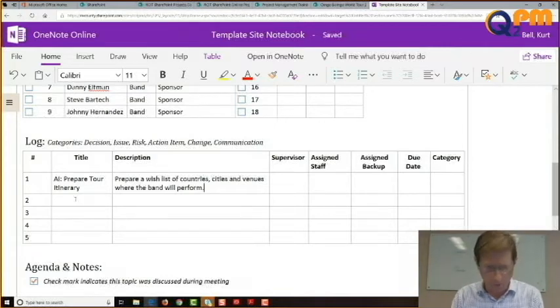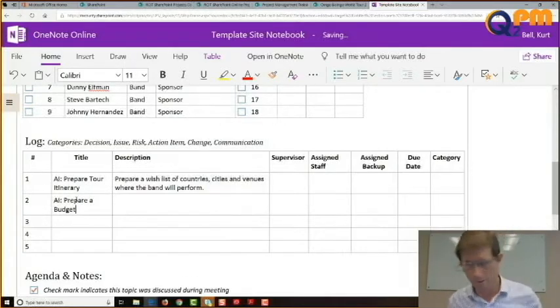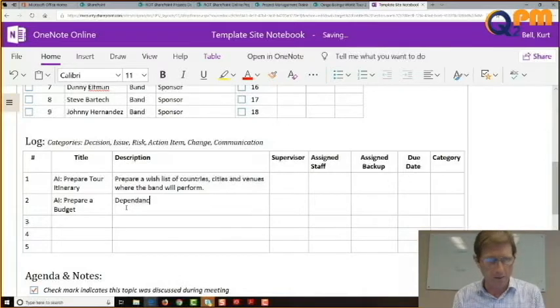Costs first. So I was asking, dude, are we making an estimate before we create a budget? I guess I would think you want to list the venues first, because then you would ask what it costs to go there, if there are any special permits or what is needed. Oh, so that's a dependency. And then you can determine if it's over budget or within. Okay, great, that's just my thought. Okay, so we're going to add a description, but I'm going to add a dependency, I can never spell this word. Dependent, there we go, thank you.